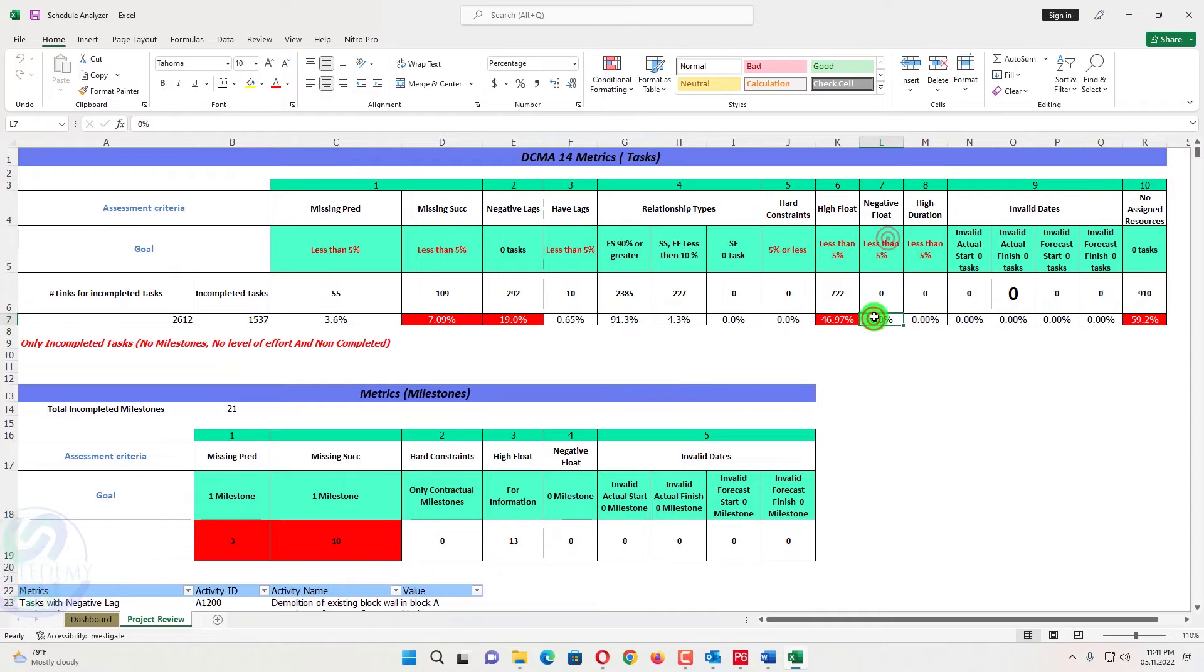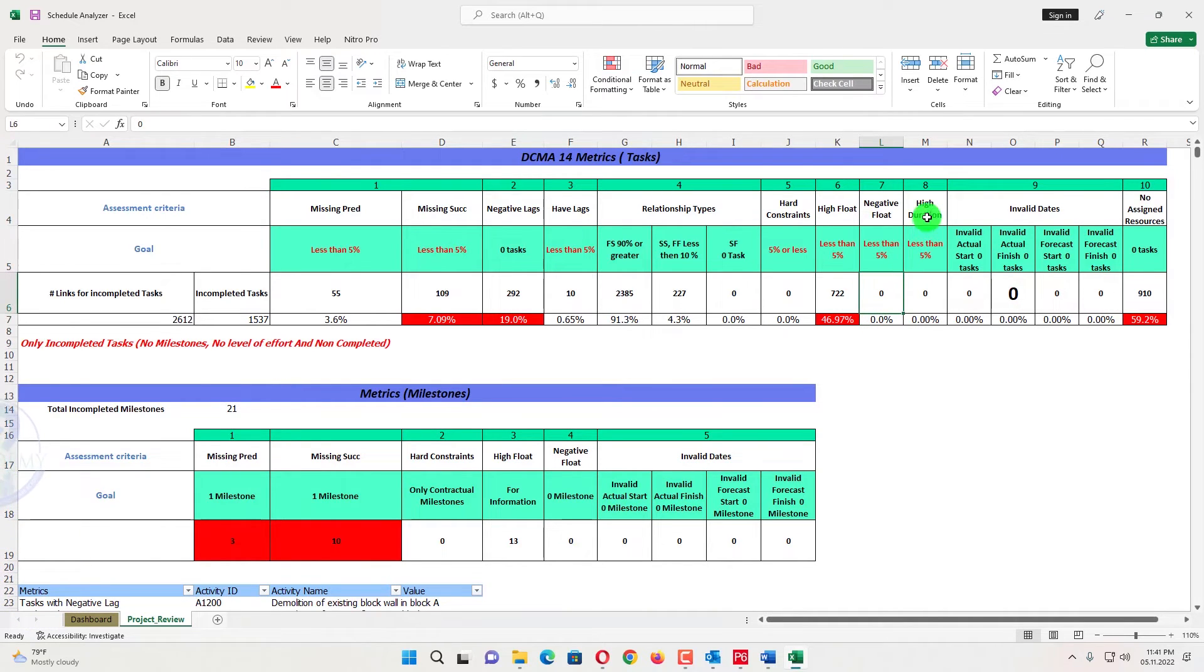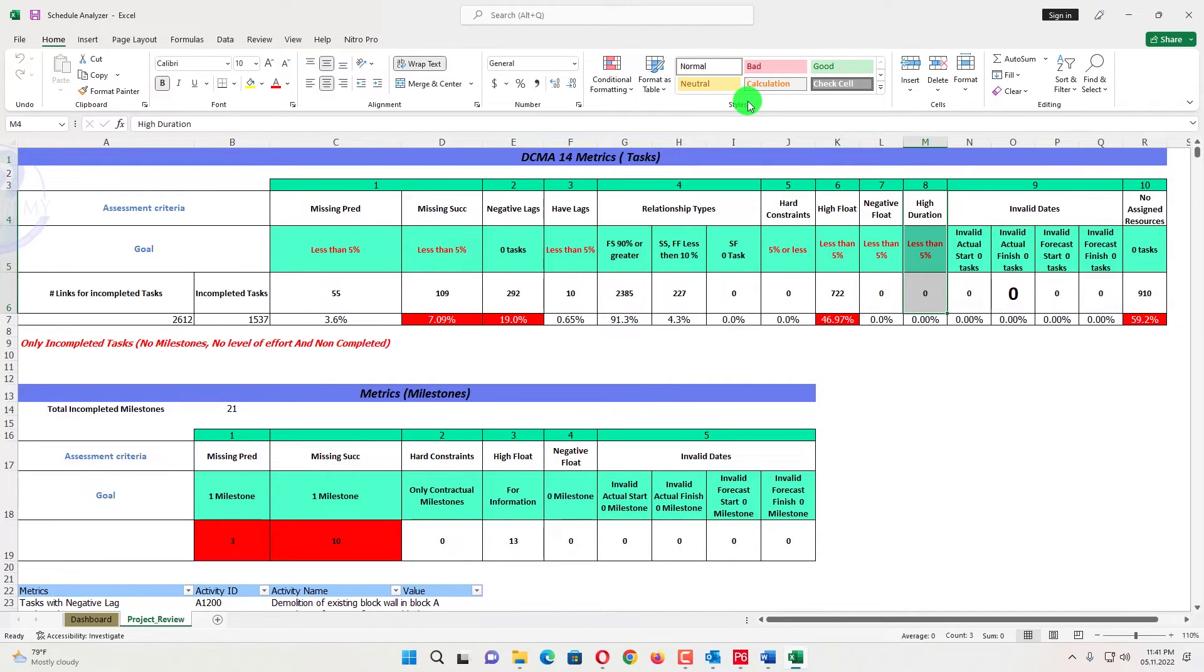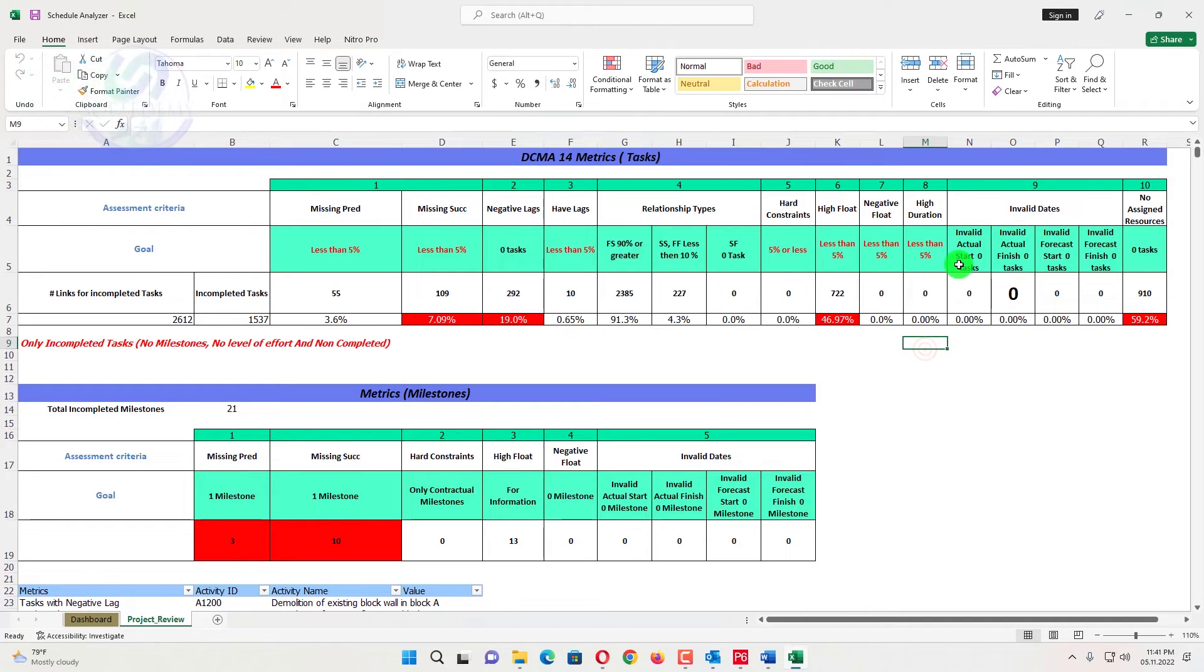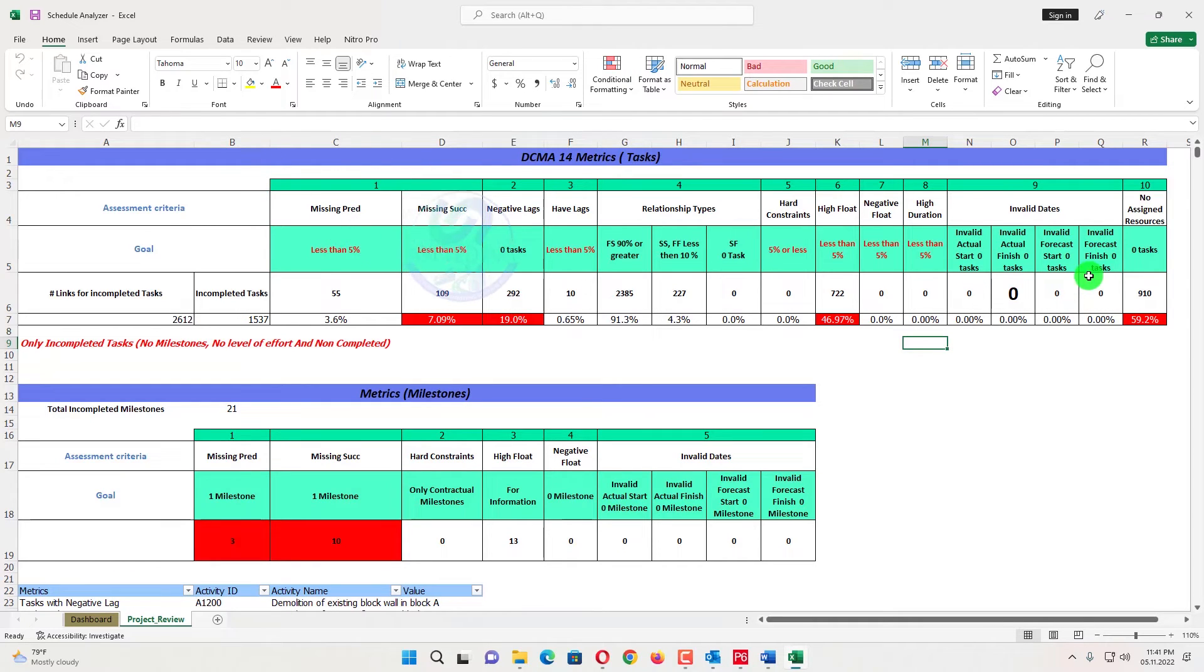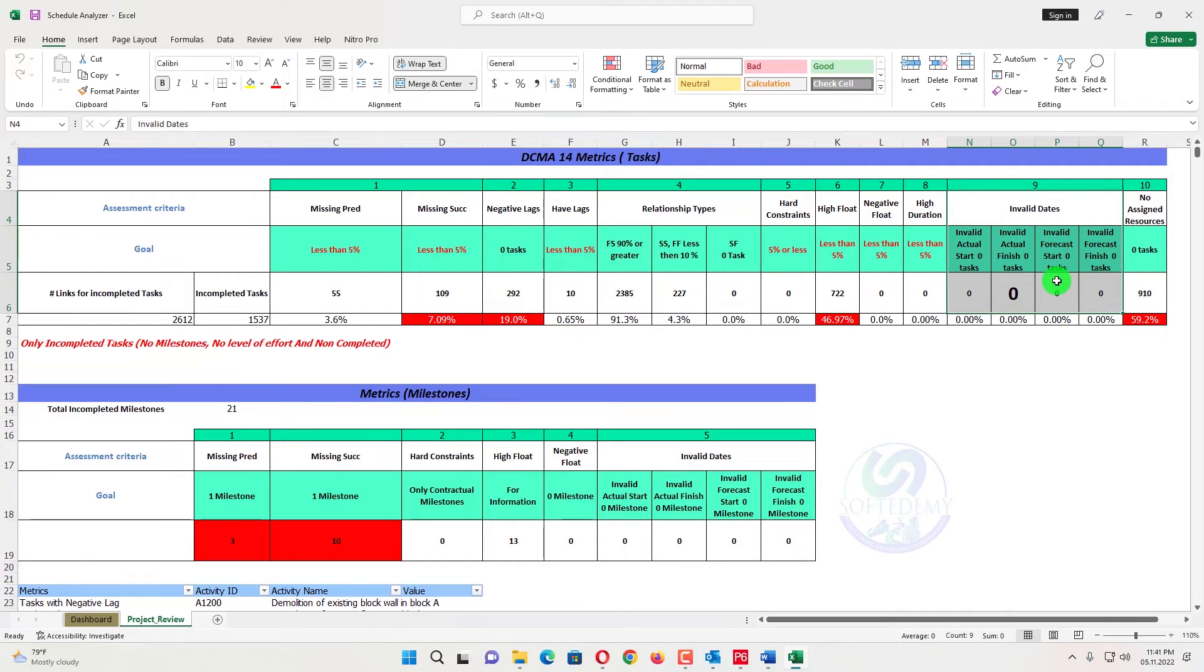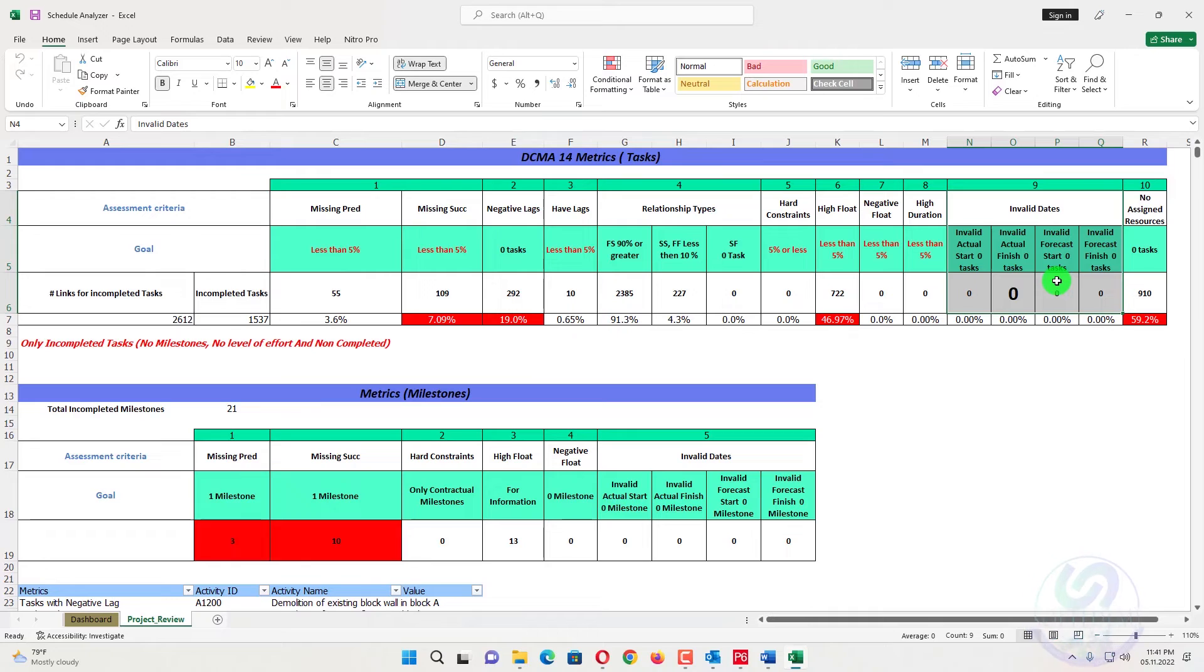The next one negative float, it should be less than 5%, in this case zero. And then because the this the based on zero float, that was negative float is zero right now. Higher duration, activities do not have more than 28 days duration, should be less than 5% here. No activity. Then invalid actual start zero, invalid actual finish zero. Also invalid forecast start zero, invalid forecast finish zero. That's all invalid dates. Invalid dates means there are some dates you have added which are not compatible with the version. So that one of that one are invalid dates.